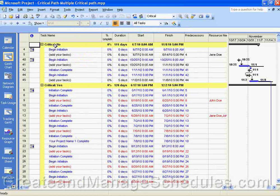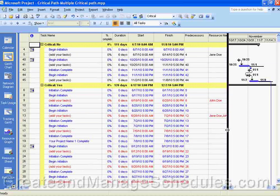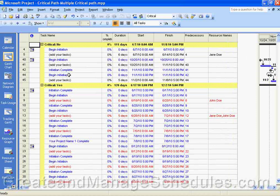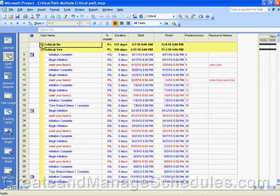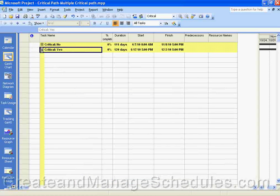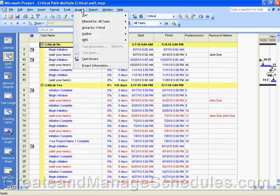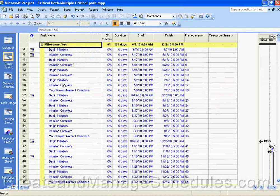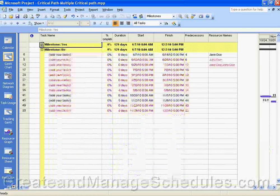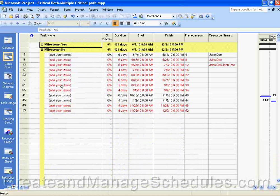If we select Group By Critical and click on that, we can see it now says 'Critical: No' and 'Critical: Yes.' This is a short schedule, so there aren't a lot of tasks, but it has grouped the tasks by critical. Project has added headings for each of the groups, highlighted with yellow text so they're easy to see. You can collapse the groups. Now let's say we wanted to group by milestones — anything that's a milestone appears in the 'Milestone: Yes' section, and all other tasks appear in the 'Milestone: No' section. We can collapse or expand these as needed.